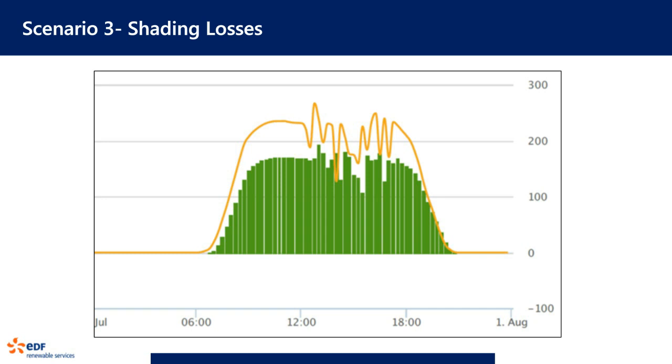In this case, per our land lease, we had negotiated in advance that we would have rights to trim the trees as needed. But then, of course, there's always the cost analysis. How much is it going to cost to trim the trees, and will that really boost production enough to cover the cost? So we did our analysis and determined that tree trimming was well within the payback curve of our budget. And so we decided to get those trees trimmed.